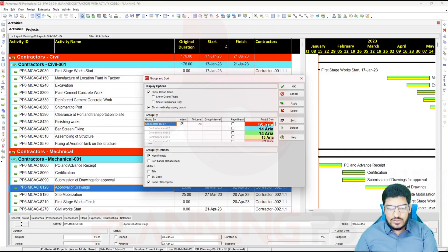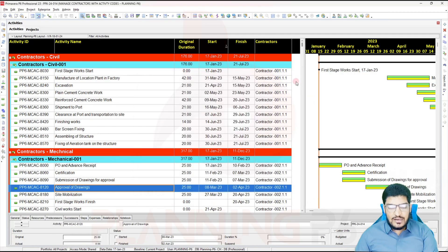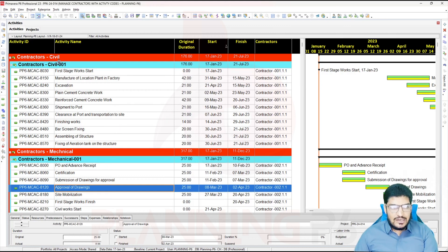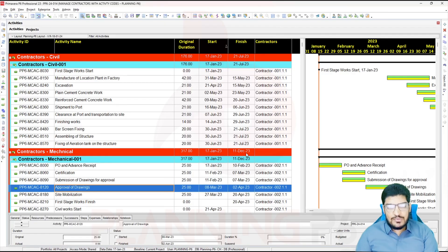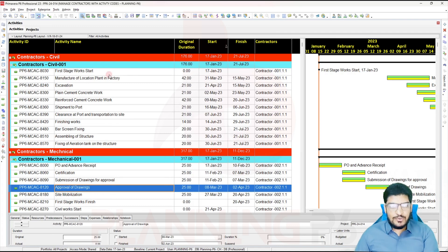By default values grouping and sorting it will show you. You can see the tutorial on visualization of your software. Here you can see under the contractor the schedule percent complete — each and everything you can now manage. Where the code is assigned, you can see: Contractor Civil duration is 176 days, starting and finishing on this date, and Contractor Mechanical starting and finishing on this date. If you want to see actual cost, schedule percent complete, performance percent complete, earned values, variances — whatever you want to see, it will roll up here.